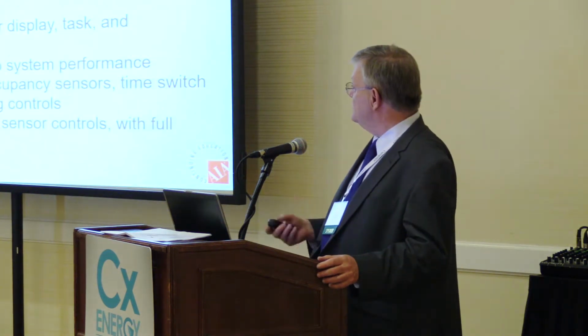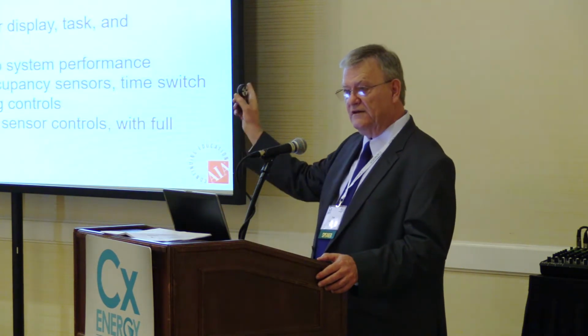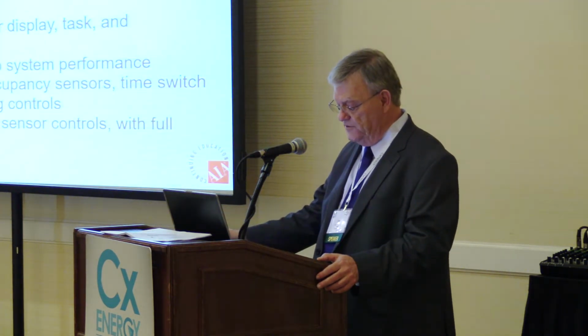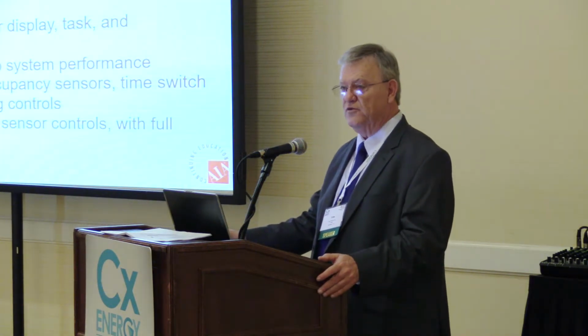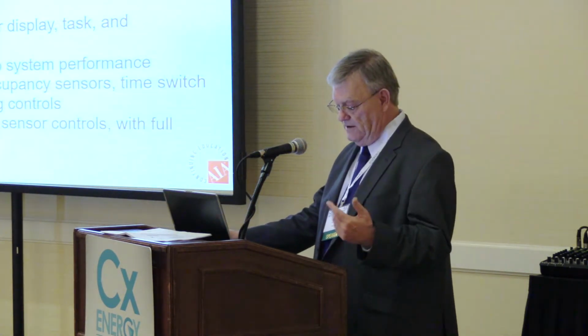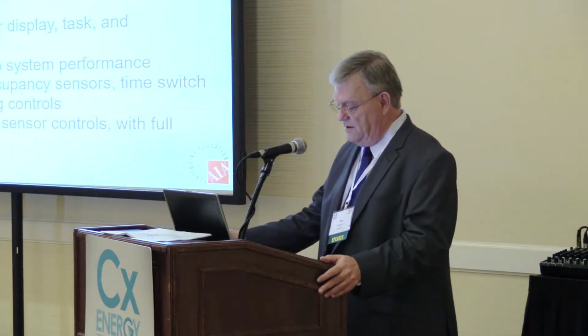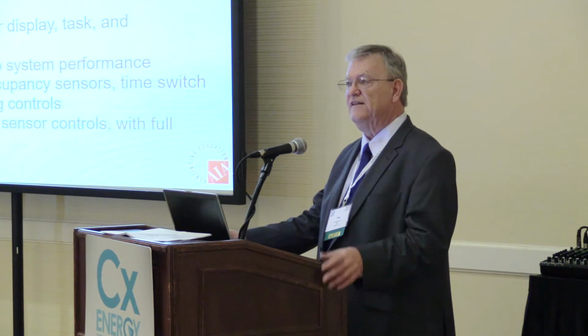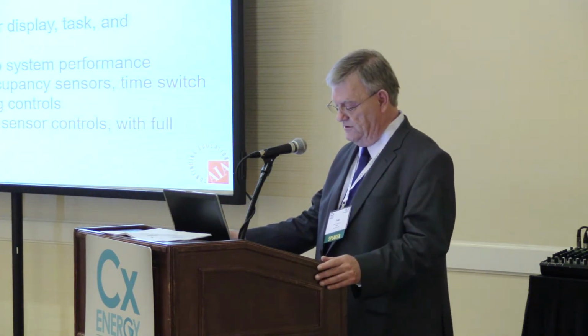You want separate controls for all these other lighting, the different lighting that we talked about in ASHRAE in one of the previous versions. The design professional is supposed to attest now to system performance. That means that that's me. I have to eventually, before final inspection, provide evidence to the AHJ that the system has been tested in accordance with the codes.